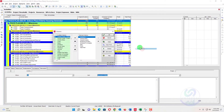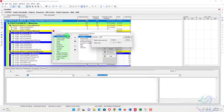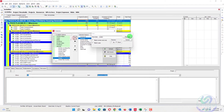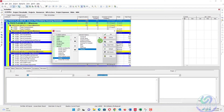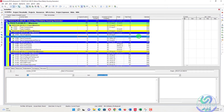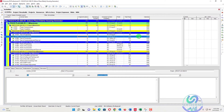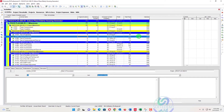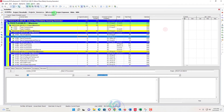I will show my calendar by going into the columns and finding my calendar. From the calendar I will see which calendar I have assigned — mostly I assign a project calendar. I use different project calendars for different projects rather than a global calendar, because when I export or import a project into another database I need to know which calendar was assigned. In this project I have assigned the EPE calendar — five working days, 10 hours per day.